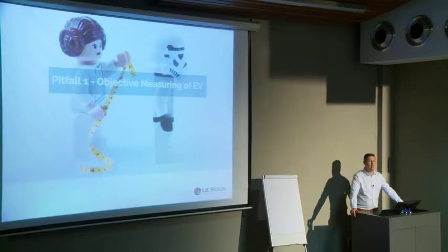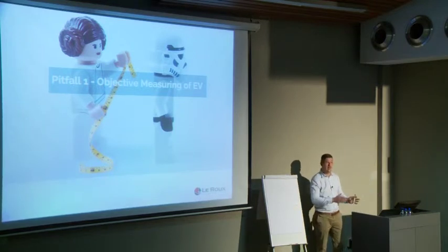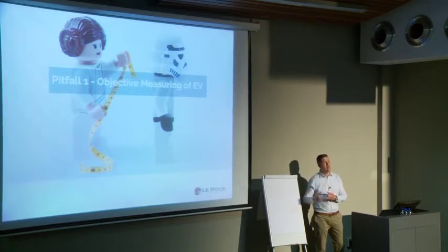Good. Milestones. Very good. So milestones is something that we can set objectively, and it can be something like, all right, design needs to be finished in this first phase. We're going to spend 800 hours. That's our plan. But the measure of whether we have achieved that portion is a quick yes or no. Did we sign off the design with the client, for instance? Secondly, can be, let's do the graphics of this app. That's the second milestone. That's another 800 hours. It's a quick, you agree, objective. Is the graphic complete and signed off by the client?